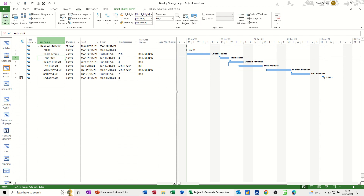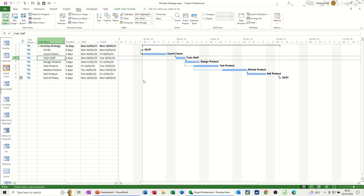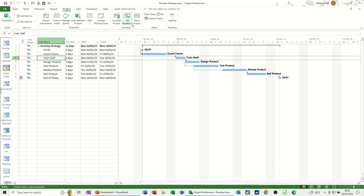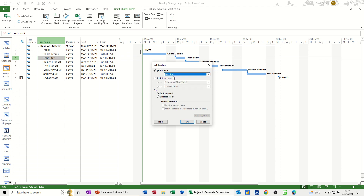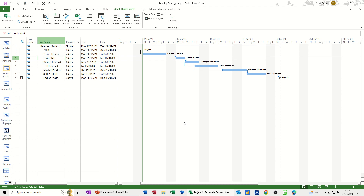Now I want to save this as a baseline so that I can start tracking my project's progress. Go up to the Project tab and you've got Set Baseline. You've got 11 baselines including one without a number which is the default, so I'm just leaving it on that. What that will do is capture information such as start and finish dates, duration, resource allocations, work that's been partly completed, and time-phased work. Click OK. You only really save a baseline when your planning phase is finished and you're ready to move forward — any changes you make will now be reflected against that line in the sand.